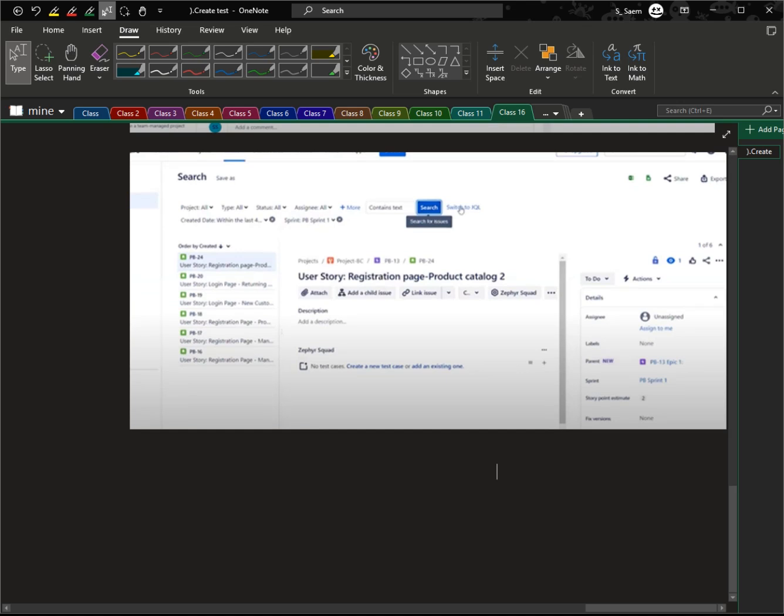Now, user stories remain in the sprint backlog until business analysts refine them, story points are assigned, and sprint planning is completed. Subtasks are then created by the team leads, for example, technical lead for developers, test lead for testers. Development and testing managers distribute subtasks to specific developers or QA testers. Okay.